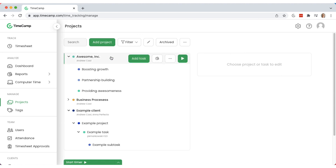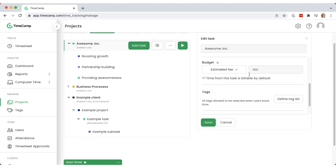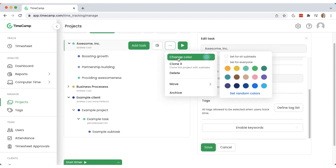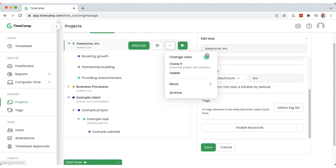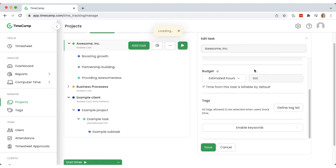You can set a time or money budget in the particular task view and mark the time logged for these tasks as billable by default. Choose a color for each project for better visual effect and more transparency.